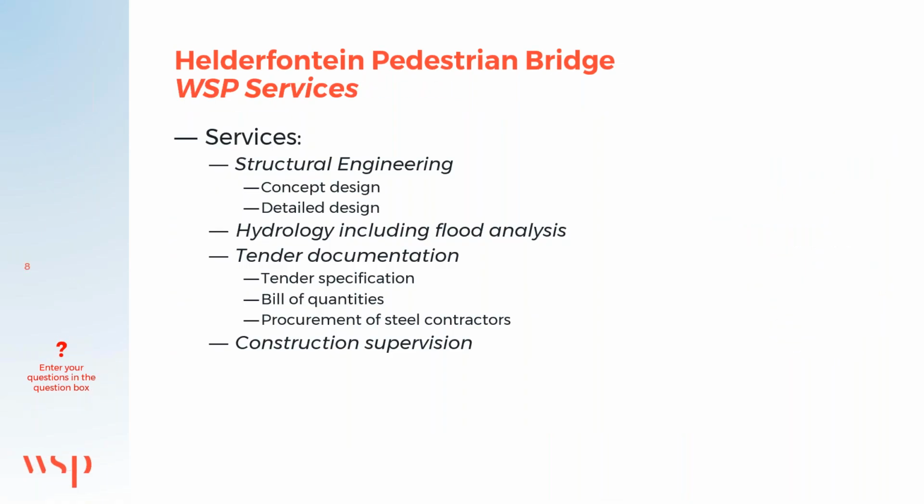With regards to WSP services, we provided structural engineering services consisting of concept design and detailed design. We also conducted the hydrology analysis, including the flood analysis of the river. We assisted with the tender documentation, including tender specification, bill of quantities, as well as procurement of steel contractors. For this, we assisted in obtaining quotes from various steel contractors, and we assisted in providing the client with recommendations on this basis. We then conducted the construction supervision for the entire construction period for this bridge.